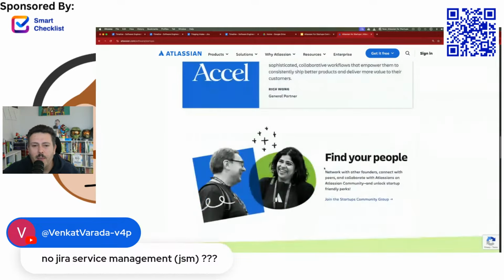And you can see which team has ownership because each key is slightly different, right? So the Android team is going to have these two epics. My user experience team is going to have this epic. My iOS team is going to have this epic. And they are all nested underneath that initiative. And this is very powerful. And then taking that step further, the stories underneath that epic can then basically be the stories that are actually going to be done by the individual team, that are going to be planned into your sprint, that are then going to be estimated, which is what we're going to do next.